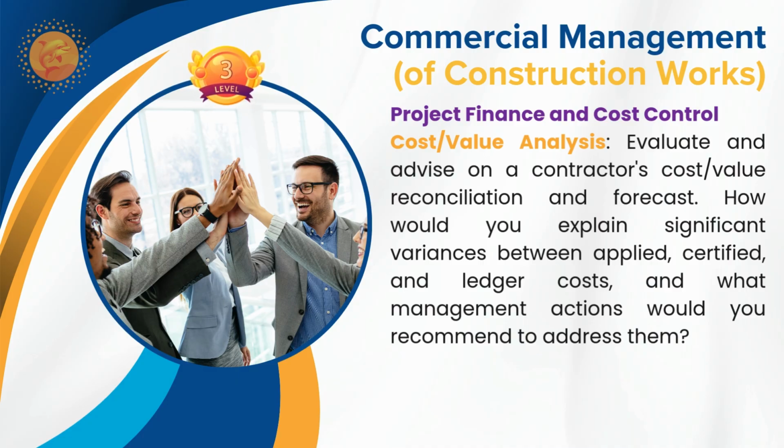But there is other cost control that comes from the employer's point of view, where change control is very important, because change control directly impacts the cost of the project for the employer, not directly for the contractor. Because if the contractor is working with their original scope, there should not be anything called change. It should be included within your deliverables, that means scope of work. That one we will be discussing during our project financial control and reporting.